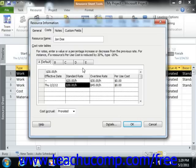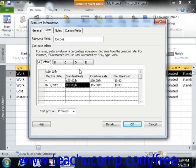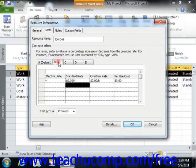The different pay rates shown on the different tables can then assist you in using different pay rates for different types of work that the work resource can perform. For example, a single work resource that earns one pay rate for painting and another pay rate for roofing. In this case, you can enter the two rates onto these two tabs, A and then B, and then switch the rate based on which type of task is being performed.